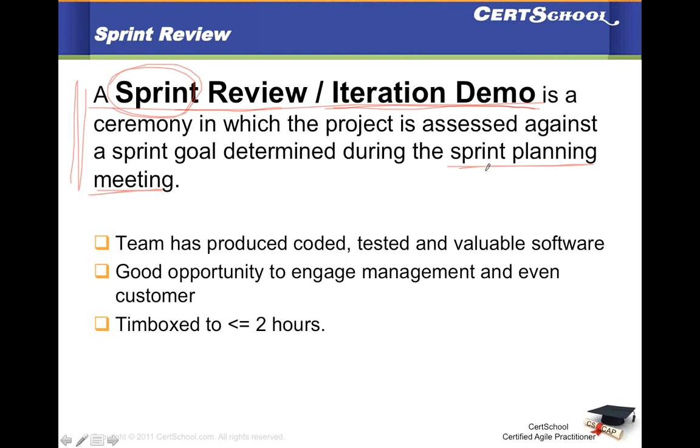Another important thing here to note is that this is an objective review. It is not just whether we finished the story or not. There is a true demo. What it means is that, let's say you finished 6 stories. Okay, so you close 6 stories. What you would do is you would actually do a demo of those stories and see them in action.